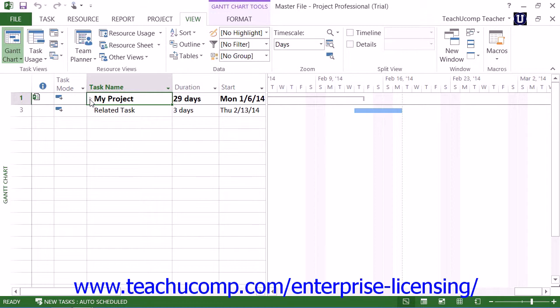This is a great feature for people who need to manage and coordinate multiple smaller projects. In addition to this feature, you can also create task links between these linked subprojects within the master project file. This is a terrific feature that allows you to coordinate related tasks between project files.